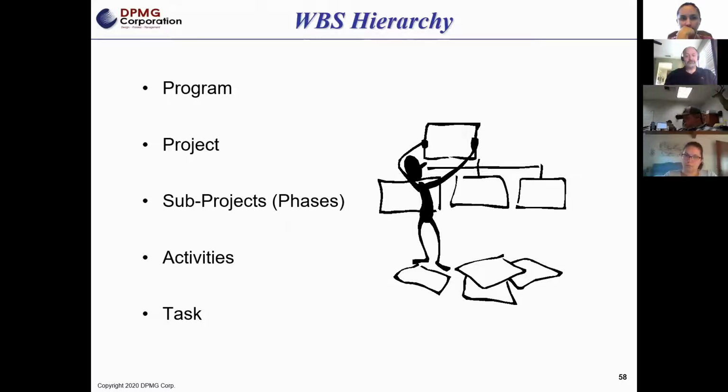And work packages are individual work that needs to be performed that get handed to an individual and say, you're going to do these 3 things to complete this task. That's a work package. And there are times you actually need to get to that level of managing. But for the purpose of this class, task is going to be the lowest level that you need to go to.